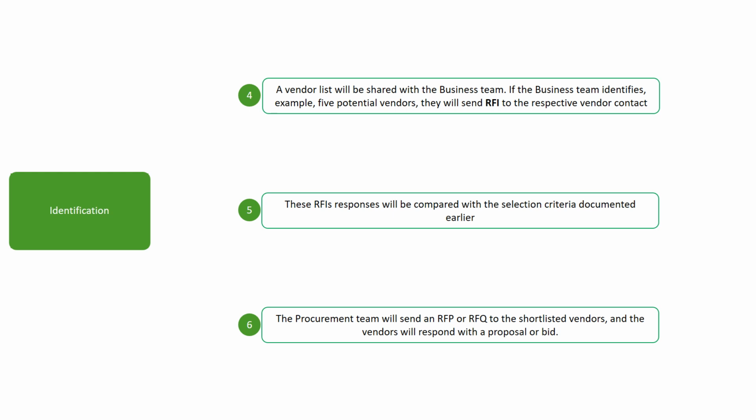Pricing/cost breakdown, detailed pricing for products, services, licenses, support, and any optional features. Terms and conditions, contractual terms, warranties, service level agreements, SLAs, and compliance details. Value additions, any additional features, benefits, or differentiators the vendor can provide. In simple terms, a vendor's RFP response answers the question.